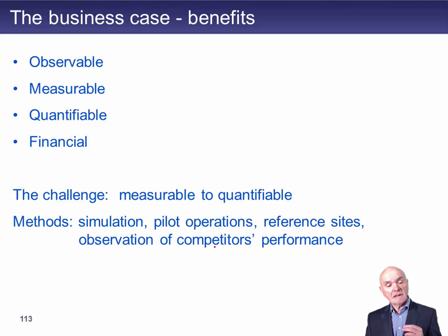Quantifiable is where it's measurable and predictable. Now, this is where, really for the first time, we begin to get useful information for the cost-benefit analysis. So we say to ourselves, we have some evidence of some sort that if we put in this new IT system, then the volume of sales will increase by 20% from 10,000 units to 12,000 units.